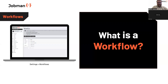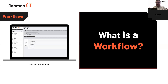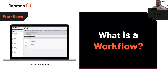So what then is a workflow? The workflow is the sequential order in which we expect these operations and tasks to be done. A workflow is the culmination of all those tasks and operations in an order that makes sense. Generally speaking, most companies can't purchase-order the raw materials required for a job until they've gone through the process of detailing or production drafting to produce the optimised list of materials. So doing that process first is really important.